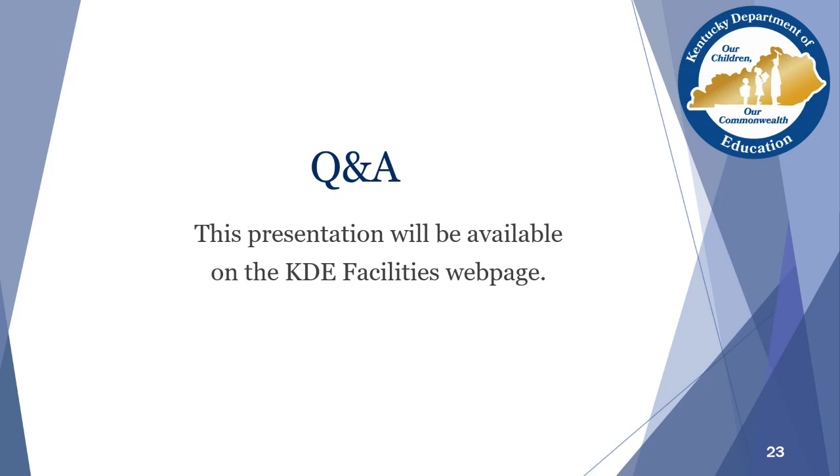In the typical process for any tier except tier 4, we will receive a construction document submittal, and that will include the final plans and specs, as well as the project manual that contains the invitation to bids and the form of proposal. After we have approved those documents, we give permission for the district to advertise and receive bids.